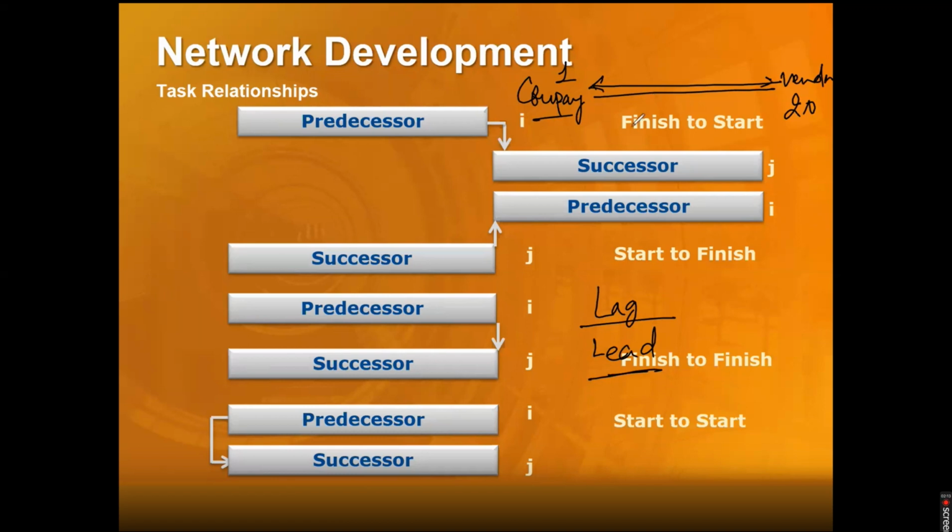In the regular world, I'm just trying to break the myth from a project management perspective. Like we talked about before and after, here also there is a change. In the regular world, even in lean Six Sigma, this is lead time, but not in project management. Here it is called lag. Lag is the delay. Delay is lag, not lead. In Six Sigma and lean, the time I have to wait we call lead time, but in project management this is called lag, not lead.